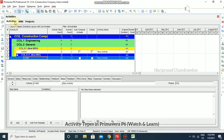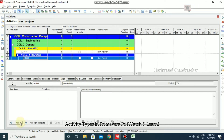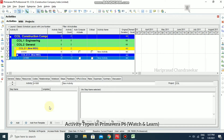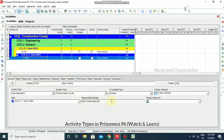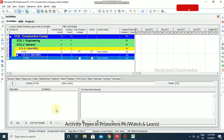You can divide activities into steps as well. There is a Steps tab in the details panel where you can add steps or add from a template. An activity's primary resource is typically responsible for managing and tracking the progress of activity steps. You can assign a responsible manager under the General tab. The project manager is typically responsible for managing and tracking the progress of the overall activity.